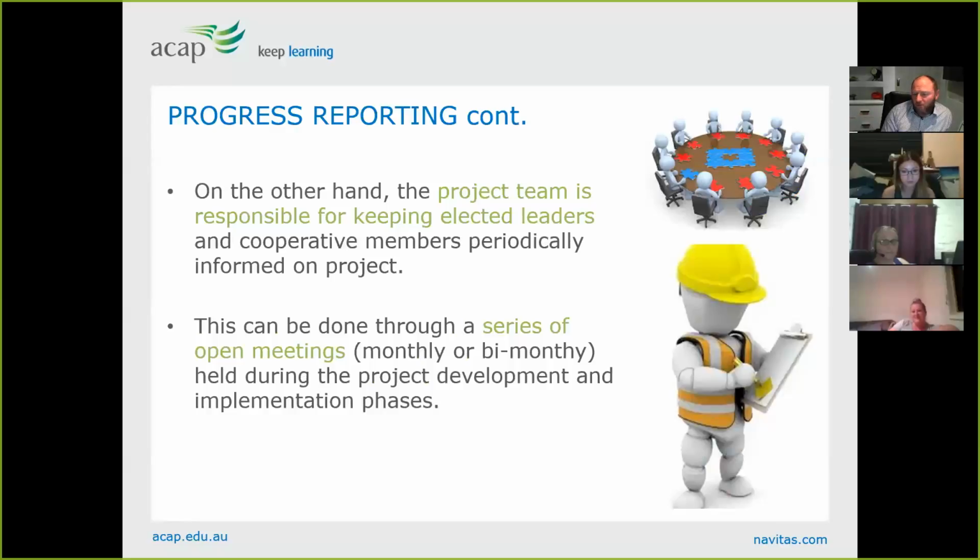The standard thing to do, if it's a big project, is probably to hold either weekly or bi-weekly meetings where everyone gets together and makes sure everything's okay. Or you might just do it on the tool that we're on right now, Zoom, the best tool I've seen in a long time. If I'm running projects now, people are all over the place. This is where I'd have everyone, and I'd be recording it and giving everyone a recorded link to every meeting. Then no one has to write minutes, and you've got everything recorded and everyone's communicating.